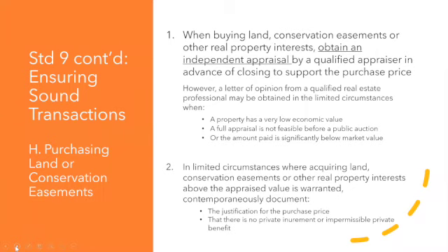As a nonprofit organization serving a public purpose and using donated or grant funding for the purchase, it's not appropriate for us to pay a premium above market value, except in very rare circumstances. And in fact, most land trusts seek to purchase at below market whenever possible. Only under limited circumstances should a land trust purchase a property without obtaining an appraisal. And in these cases, the land trust should get at least a letter of opinion from a qualified real